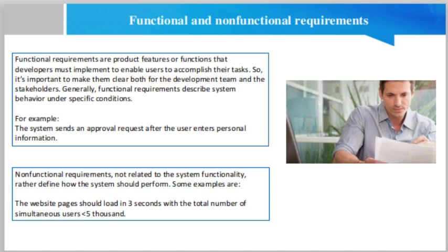Valuable, a user story must be valuable to the customer. You should ask yourself from the customer's perspective why you need to implement a given feature. Estimable, a quality user story can be estimated. This will help a team schedule and prioritize the implementation. The bigger the story, the harder it is to estimate it.